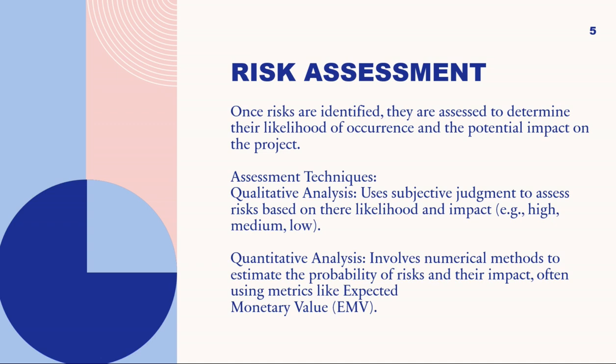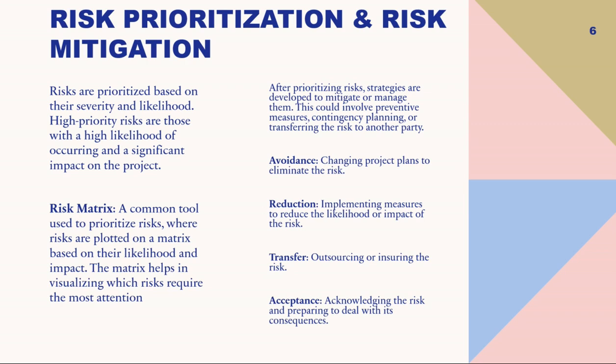So, qualitative analysis uses the subjective judgment to assess risks based on their likelihood and impact, that are high, medium, and low. And quantitative, it includes the numerical methods to estimate the probability of risk and their impact, often using metrics like expected monetary value, EMV.